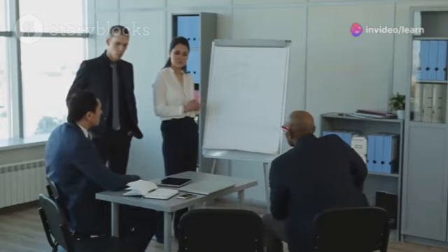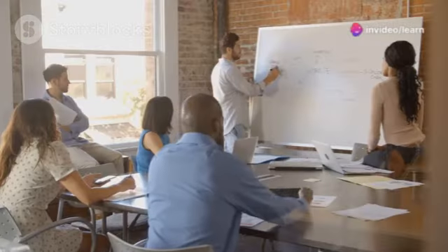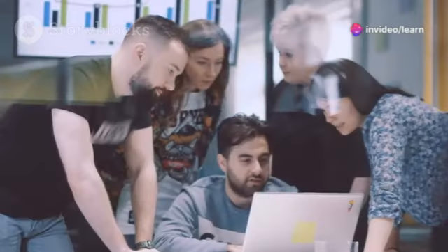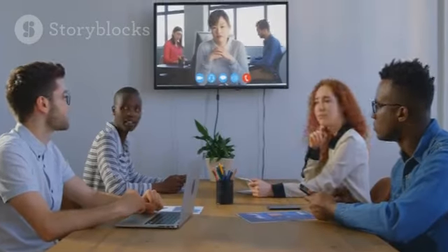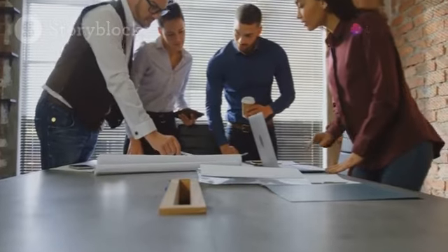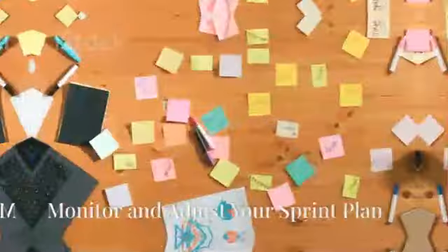Chapter 5. Conduct effective sprint planning meetings. All of this we've talked about culminates in the sprint planning meeting. It's where the rubber meets the road, so to speak. To make sure your sprint planning meetings are effective, start with an agenda. I like to start mine with a review of the previous sprint. From there, I like to move into a discussion of the sprint goal. Once the goal is set, we can talk about how to achieve it by discussing each story. Finally, the most important part of any sprint planning meeting is to get the team's commitment to the plan. Without that, the plan is meaningless.